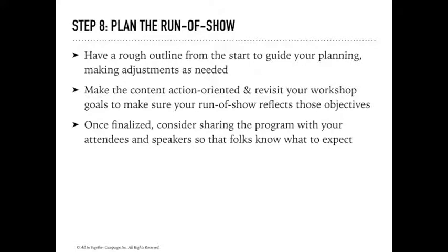of, so that you can make sure that things are running as scheduled, so that if you have someone scheduled to speak at a certain time, you're not running too far ahead or too far behind, so that everything ends on time and starts on time, and so that you're making sure that, of course, you want to be respectful of your audience's time and of your speaker's time, so making sure that you have that timeline in place so that day of, again, you can sort of monitor the flow of the event, and if you need to speed things up or slow things down, that you're able to do that.